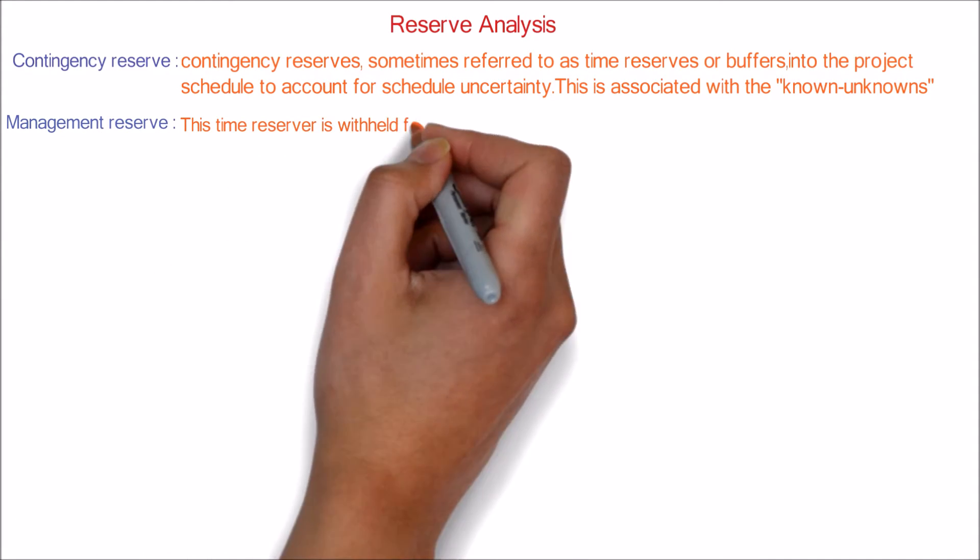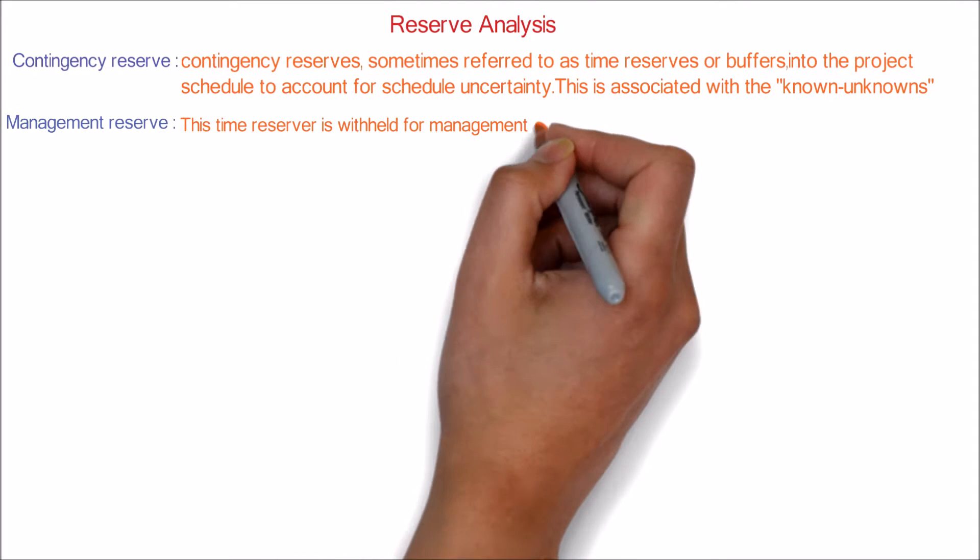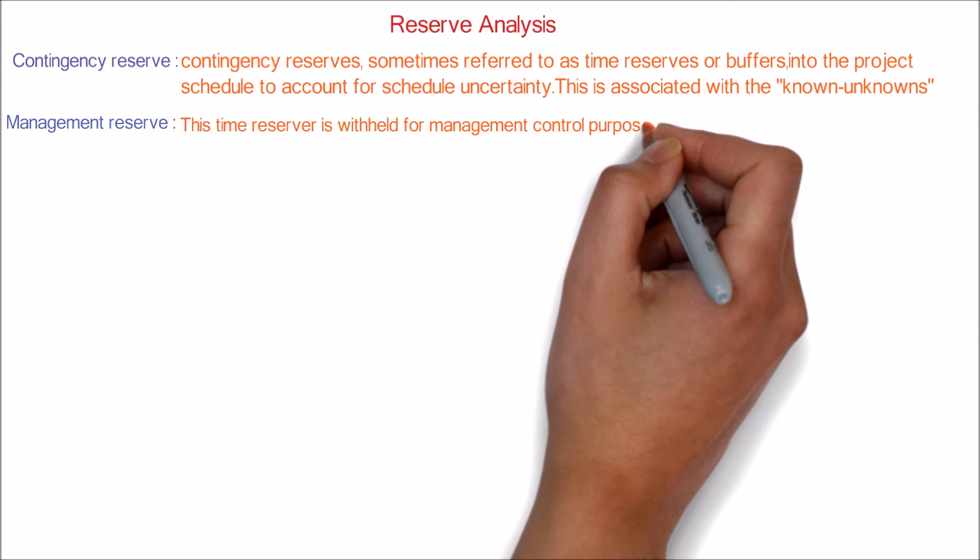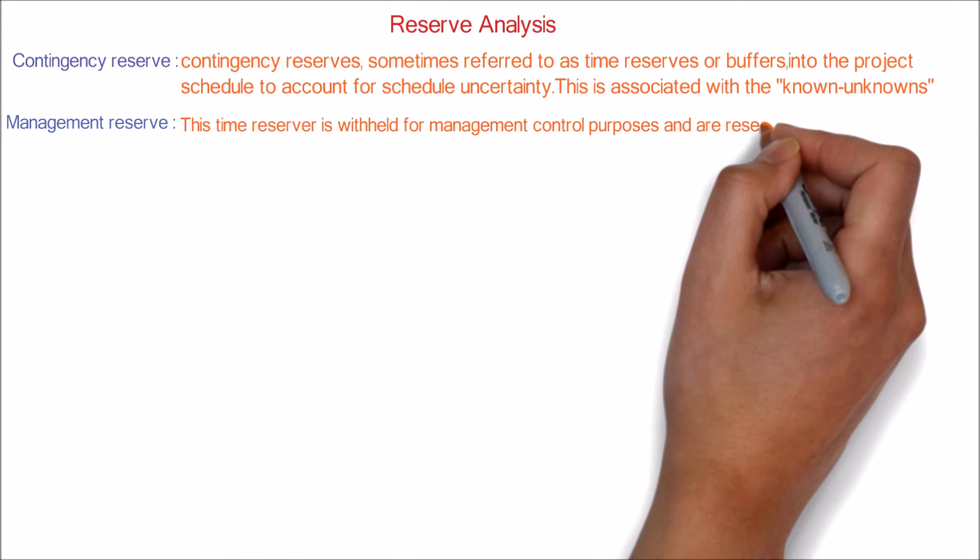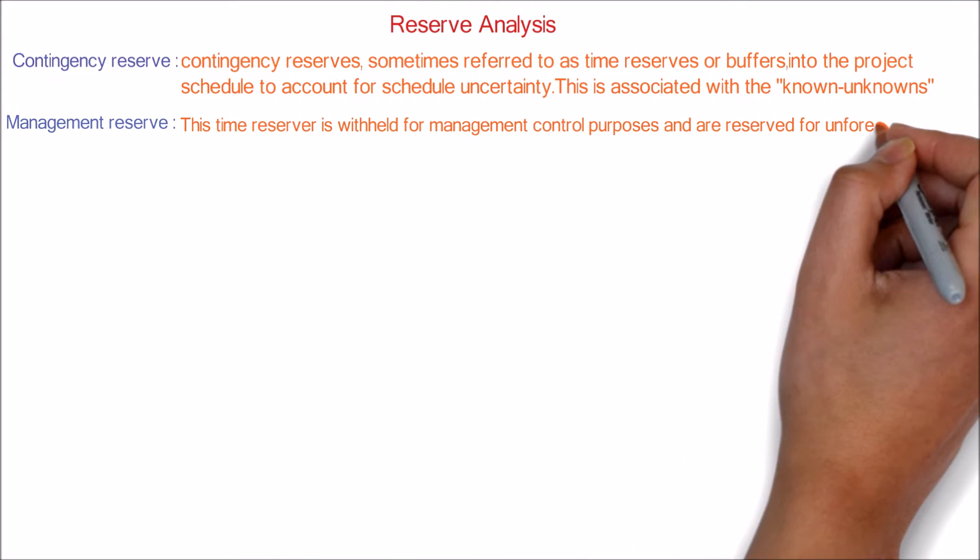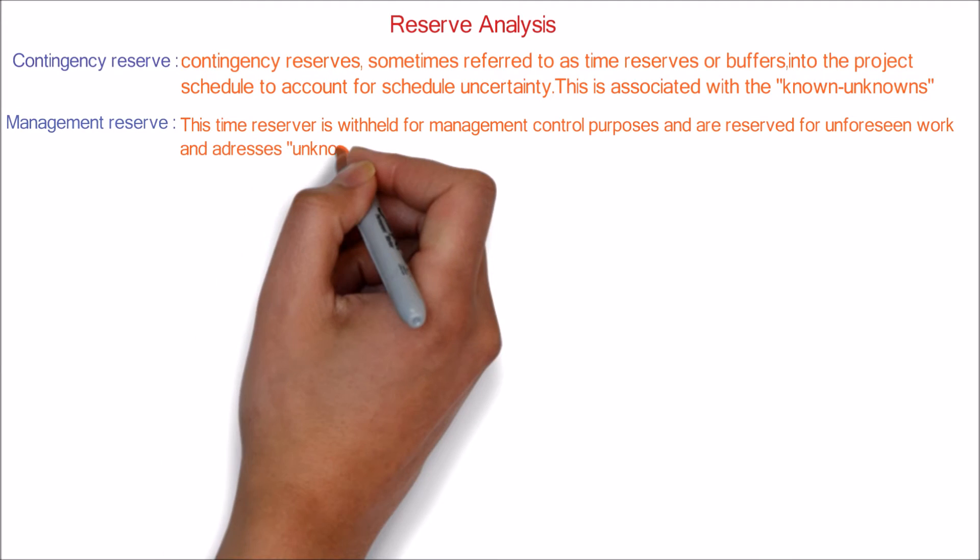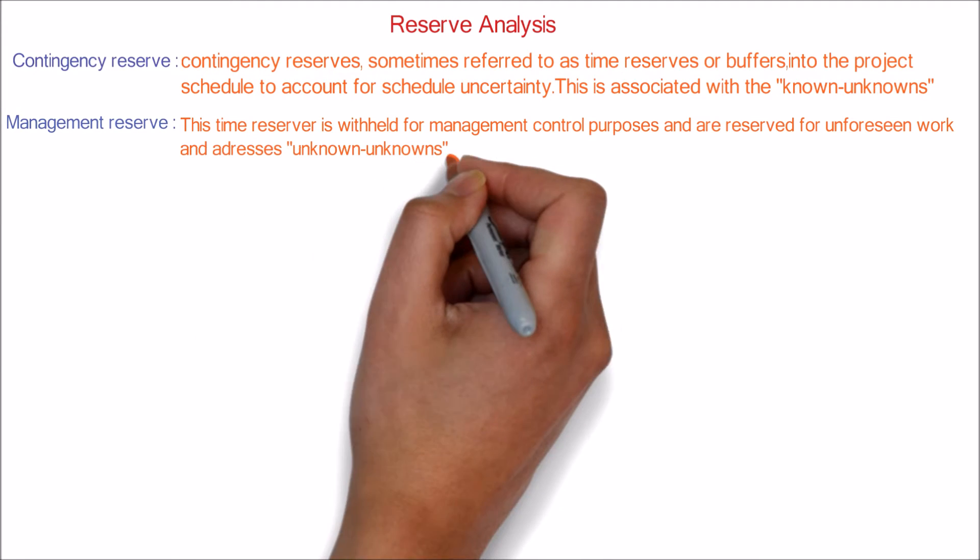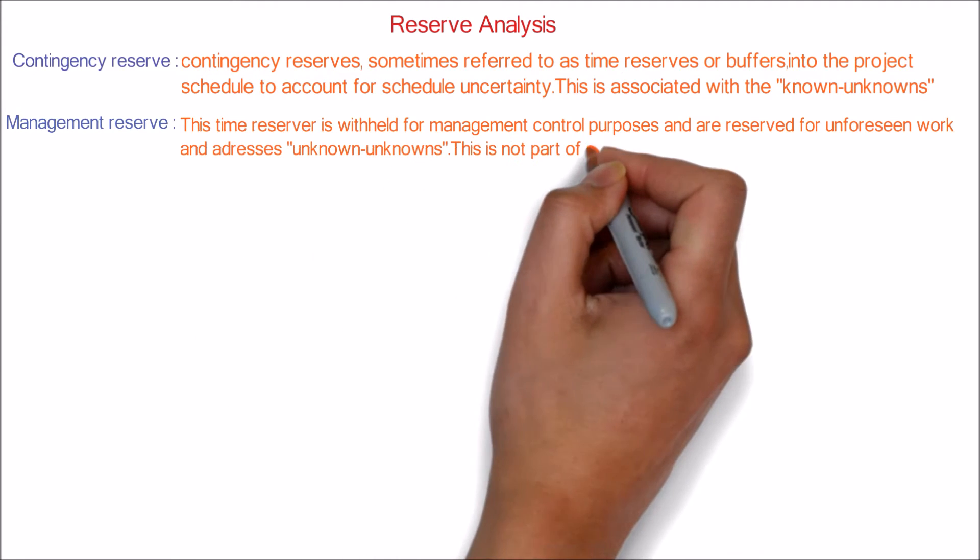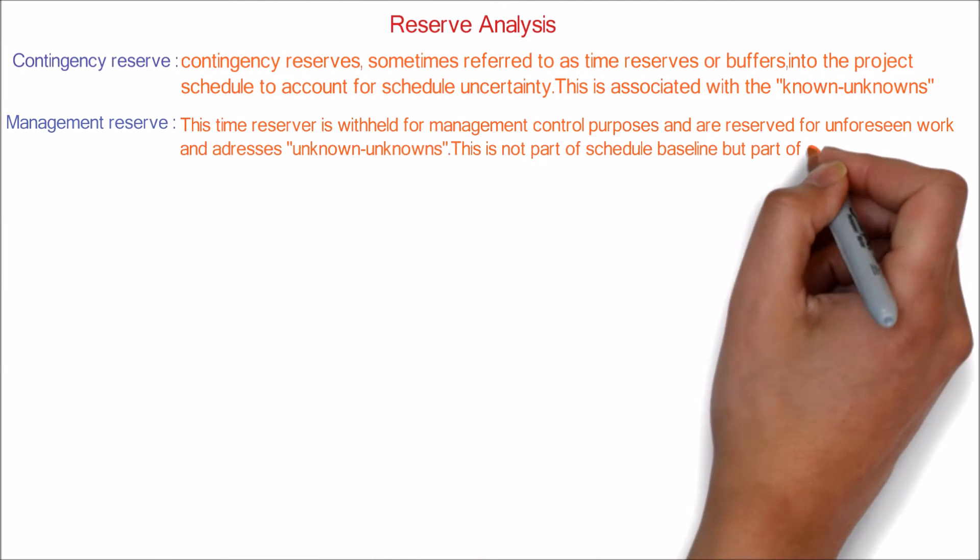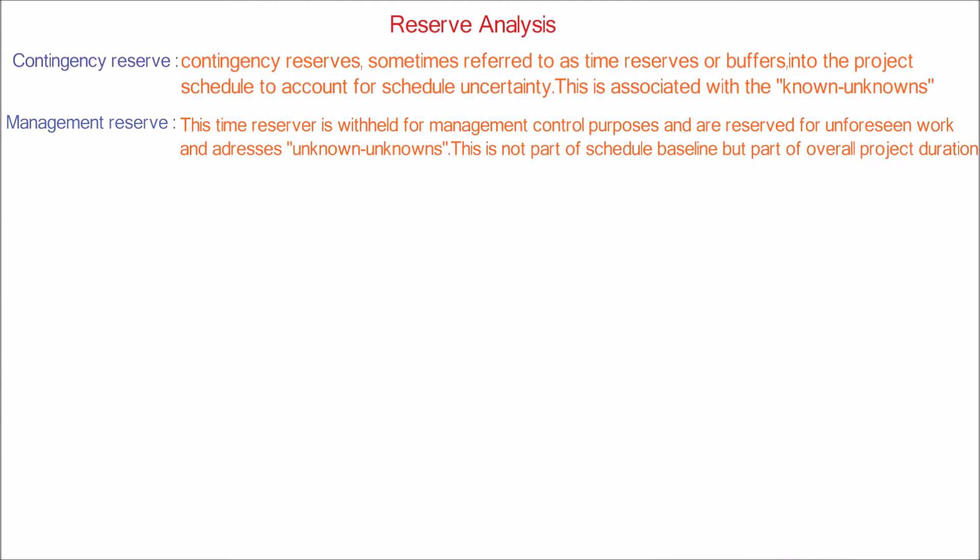Management Reserve: This time reserve is withheld for management control purposes and is reserved for unforeseen work, and addresses unknown unknowns. This is not part of schedule baseline but part of overall project duration.